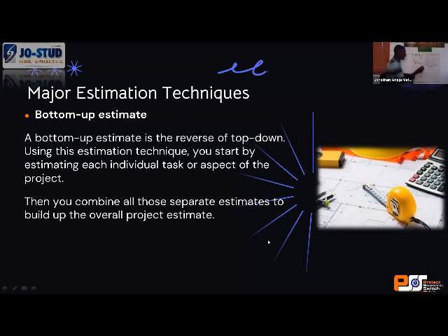So you backfill. After backfilling, still on foundation, you have add core. After add core, still on foundation, you can now lay DPM. After laying the DPM, you now say DPC, which is what we call German floor, right?